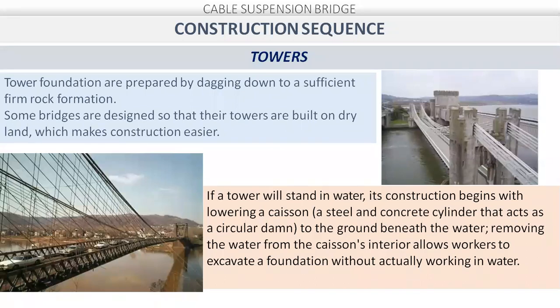Looking at the construction sequence, the first step is the construction of towers. The most important thing in tower construction is the foundation. The ultimate load will be transferred into the ground, so the foundation for the towers must be on firm rock formation.